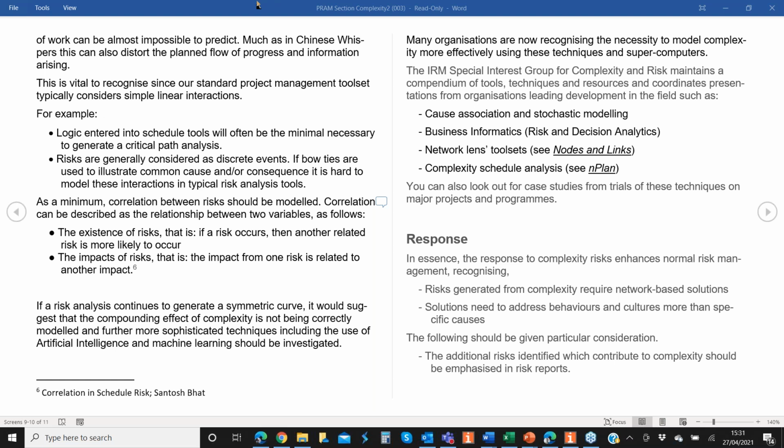Where it becomes a complexity issue is if I've got a third party supplier who's also been invested in by another company who are investing in me, and there's a conflict of interest. That's when things start getting complex, because of the interrelationships between organizations. So there is quite a clear differentiator between what is a complicated and difficult thing to do and what is a complex problem which has got emerging properties due to the relationship nature.